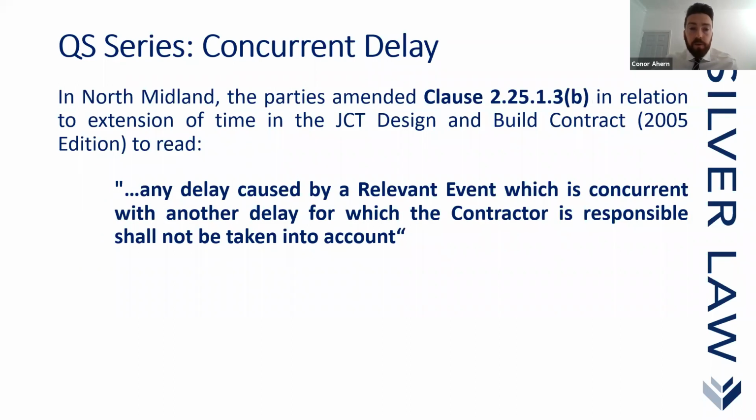Okay, so in North Midland, the parties amended clause 2.25.1.3b in relation to extensions of time in the JCT design and build contract, basically to read that any delay caused by a relevant event which is concurrent with another delay for which the contractor is responsible shall not be taken into account when calculating the extension of time which the contractor may be entitled to.